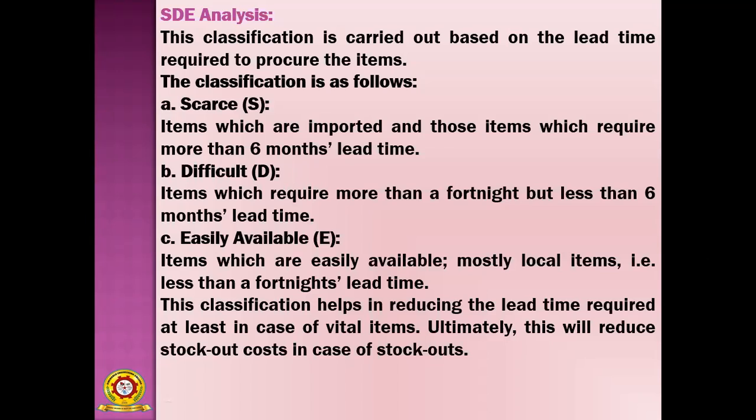So if suppose you are facing stockout issues, then this analysis is useful. So you have to maintain scarce item in a high quantity and a difficult item in a medium quantity and easily available item in a low quantity, because it is frequently available in the market and easily available in the market. That is SDE analysis.